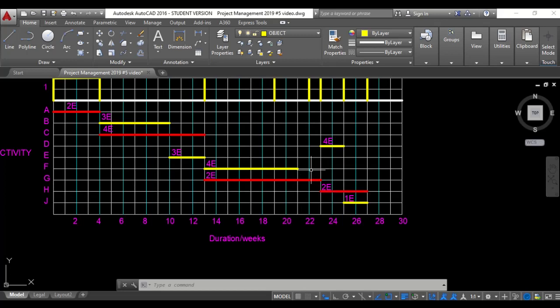So your diagram, your resource smoothing, there is not just one simple way of solving it or redistributing the equipment. It's just to make sure that you're within the constraint. So that's fine right there. So let's check. This is 6 here all the way to here, 2 here, 6, and this ends up being 3. So with this new arrangement, we are within the constraint.